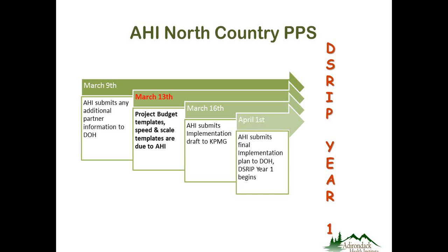So we will be submitting a draft of our implementation plan to KPMG on March 16th. Much of that implementation plan is around the current status of developing the governance and the financial model, the technology, and the workforce. So as you can see from today's webinar, there's not a great deal that goes into that implementation plan from the project side that's new or different. Really just a little more detail on speed and scale commitments, as well as some narrative description of potential risks to the project and mitigation strategies.